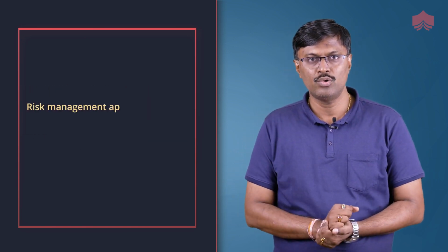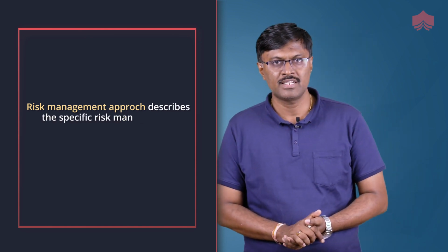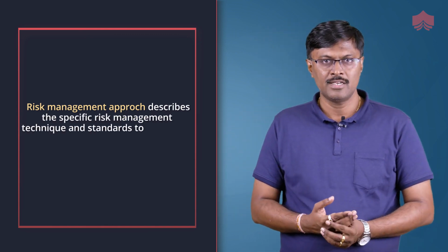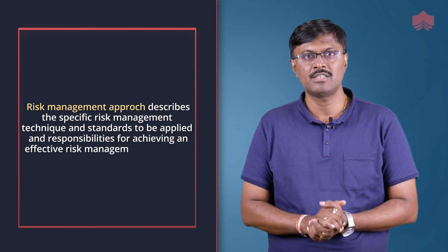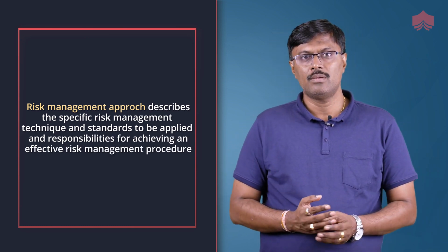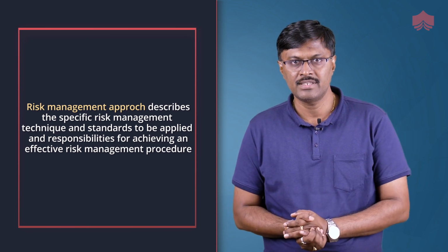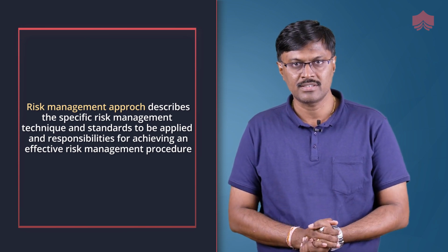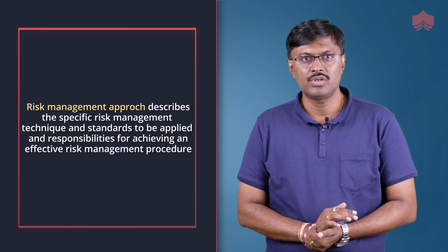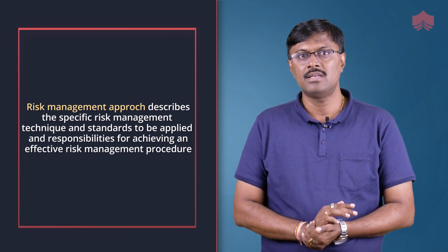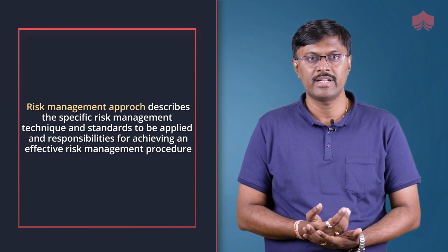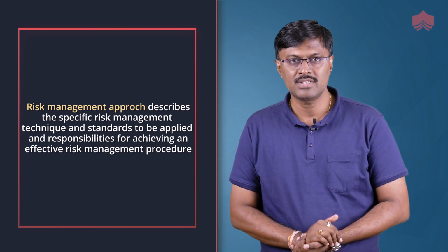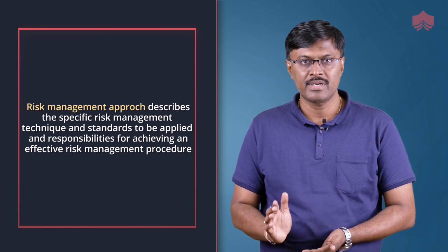So, risk management approach describes the specific risk management techniques and standards to be applied and the responsibilities for achieving an effective risk management procedure. Where the project is subject to the commissioning organization's risk management policies or strategies, the PID should refer to them rather than duplicating them. Where the project is not subject to the commissioning organization's risk management policies, strategies, appropriate strategies, approaches should be documented.